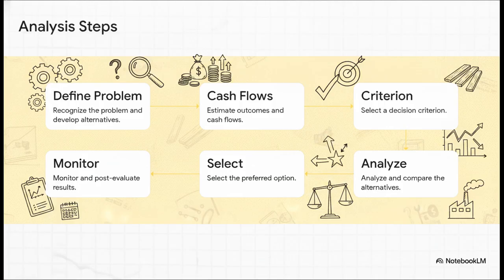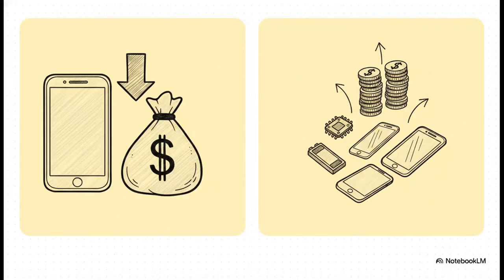Now, when you're estimating those costs, kind of like how Apple had to figure out that the iPhone X component cost was around $412 before selling it for $999, you generally choose between two techniques. You've got a broad, historical, top-down view, which is awesome when you're still refining your alternatives, or you go bottom-up, breaking the project into tiny, detailed units, which is exactly what you want when the product is fully fleshed out.